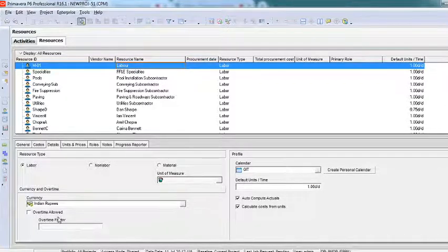There's something called overtime allowed and overtime factor. What do you mean by this? Now if you know, I'm not sure, but overtime cost is not paid to everybody. Site engineer, site supervisor, project manager, planning engineer, design engineer, none of them will get overtime cost. OT is not meant for them. OT is meant for whom? For the laborers, unskilled laborers who are on your work on contract basis. For them we give OT.